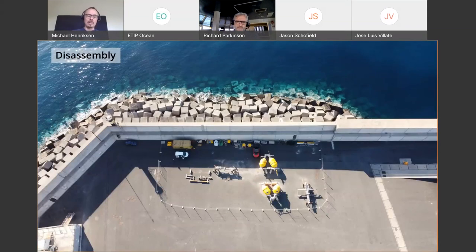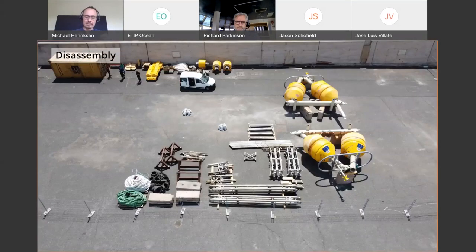And then we took everything up in the harbor that was just south of the test site, a small harbor called Arinaga. We could be working in a calm place. You can see a very nice place here. Dismantled, and actually everything from the smallest item to the biggest item dismantled to see how things were behaving, any problems with the material, components, etc. Give this input to our engineering people to update some of the design and the procedures. So that's where we are now.